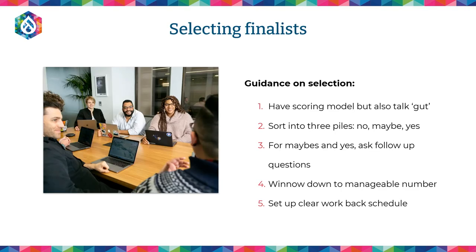And then, of course, selecting finalists. There's always going to be a mix of gut and science with selecting finalists, and we won't presume to tell you because I feel like we're biased in selecting finalists as an agency. But it's very useful to have a scoring model, and if you have a clear scoring model that you put in the RFP, make it very straightforward, and hopefully make it match the structure of the RFP and what you're asking for. But also talking about gut,